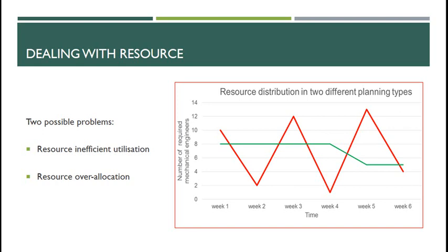You can't expect the same person to do two different jobs at the same time. And on Microsoft Project, you do see those cute little red figures appear on the left-hand side if you apply the same resource or too much resource to the same tasks. You'll come across that, and some of the challenges that you have in the later Microsoft Project tasks that I'm going to give you will be all about sorting out those issues.